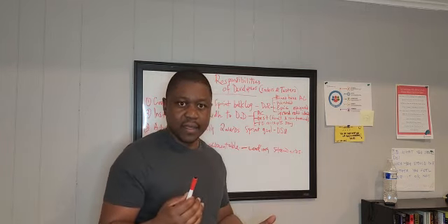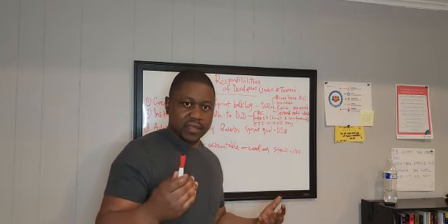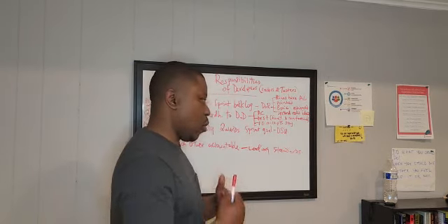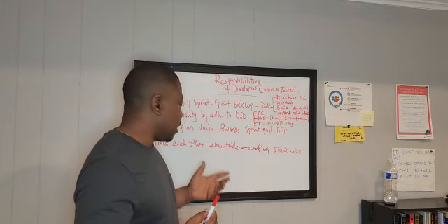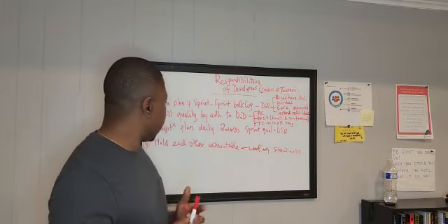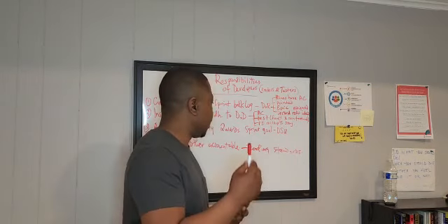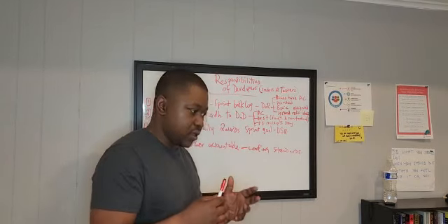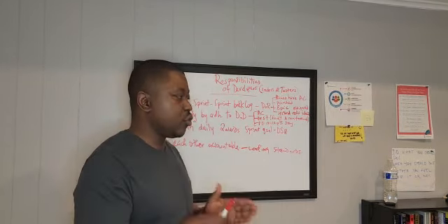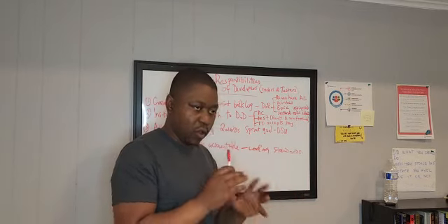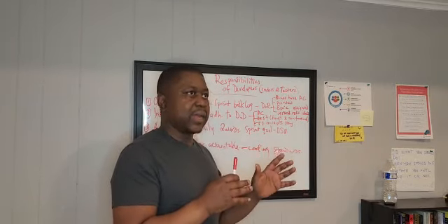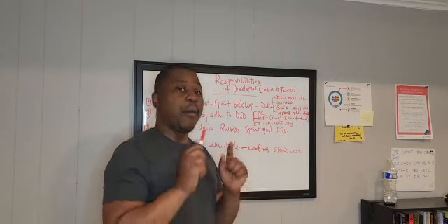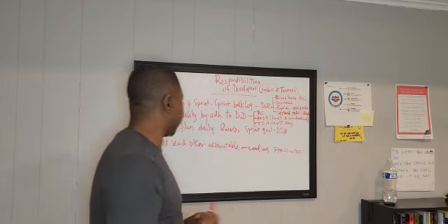As new ideas come in and the environment changes, they adapt to all that new information while keeping the sprint goal. Even if they are altering a story in one way or another, they should negotiate any alterations with the product owner, and it should go towards the achievement of the sprint goal that was decided upon during sprint planning.